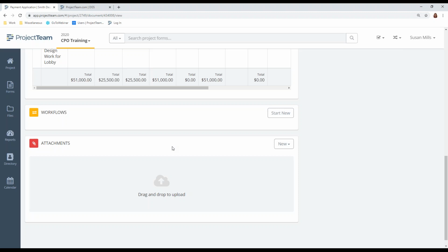You receive notification that you've completed the final step, then you print off everything and submit it into the vendor portal. Vendors should attach any supporting documentation required to facilitate the pencil copy, invoice review, and approval. You may want to discuss the requirements with your DGS PM to obtain a list of required supporting documentation. The list of documents to support your pencil copy invoice may differ from the supporting documentation required for your invoice submission to the DC vendor portal.